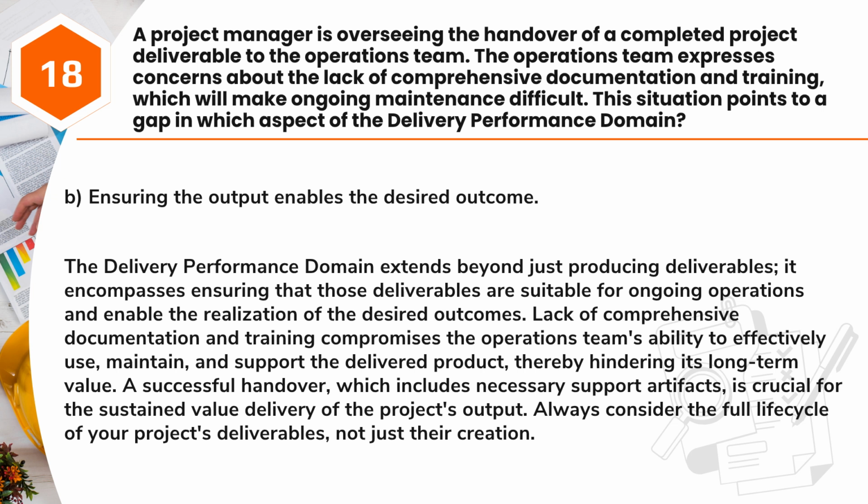Answer: B. Ensuring the output enables the desired outcome. The delivery performance domain extends beyond just producing deliverables. It encompasses ensuring that those deliverables are suitable for ongoing operations and enable the realization of the desired outcomes. Lack of comprehensive documentation and training compromises the operations team's ability to effectively use, maintain, and support the delivered product, thereby hindering its long-term value. A successful handover, which includes necessary support artifacts, is crucial for the sustained value delivery of the project's output. Always consider the full lifecycle of your project's deliverables, not just their creation.